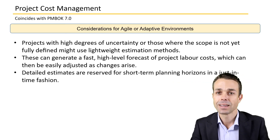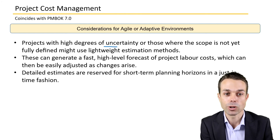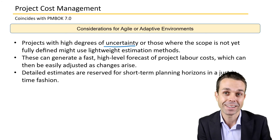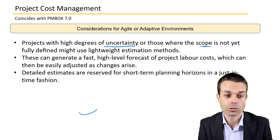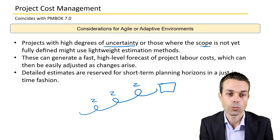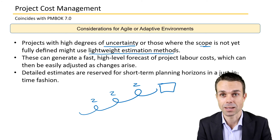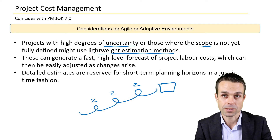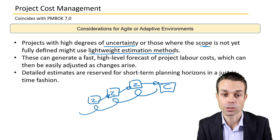For agile and adaptive environments, projects with high degrees of uncertainty — where there could be a lot of change in scope, schedule, or cost, or where scope is not yet fully defined and gets defined over time through iterations — you might use lightweight estimation methods. For example, analogous estimating is easier and faster to do, giving a quick high-level idea that can be adjusted as iterations progress until our final product and final cost baseline is created.